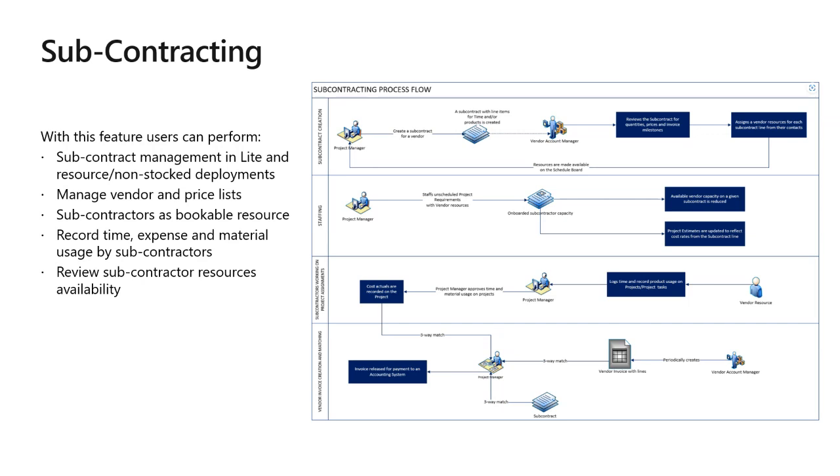But the difference now is that if you set that flag that they have to be reconciled on the Dataverse side, the posted vendor invoice lines will be sent over to Dataverse, and then the project manager will have a form which allows them to verify the vendor invoice, basically through a matching process where they are matching up the vendor invoice lines and their amounts with the actuals that had previously been approved on that project.